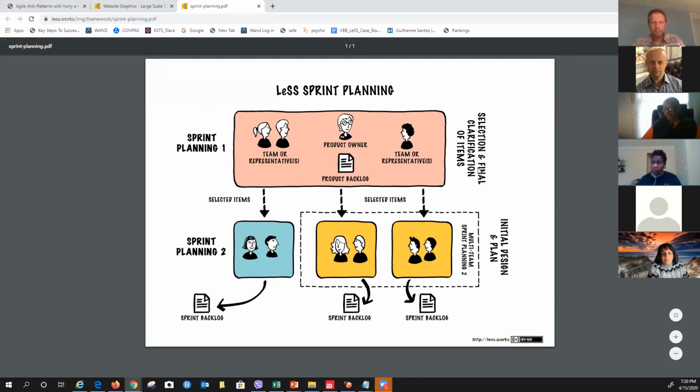So first of all, we don't see Scrum Masters in these events. Sure, Scrum Master is a super critical role, but what I'm telling you now, you would probably hear from a deeply embedded, very seasoned Scrum Master as well, if you had one. In Sprint Planning 1, you have a team representative, or maybe two team representatives from each team, coming together and meeting with the product owner.